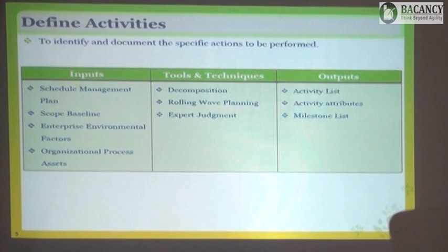Yes, that is actually a point. So that will be an input when you are defining the activities here. If you feel that the duration is too small, you probably would want to merge it with some other activity. Okay. So prepare spices will also take 30 minutes. Mix them. How long it should take? 10 minutes.